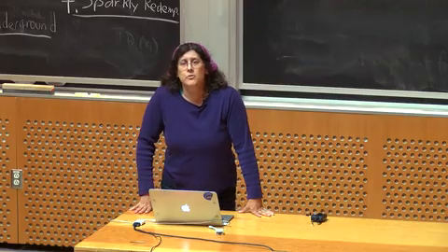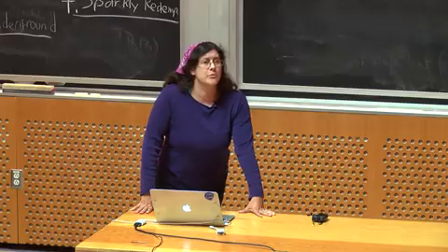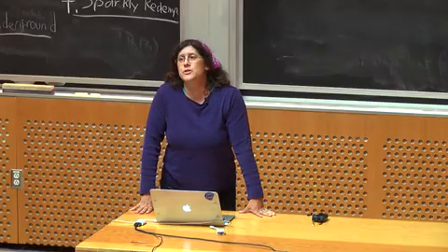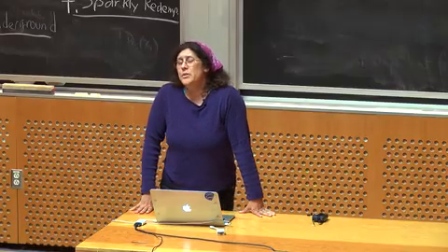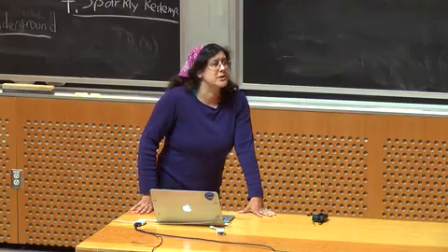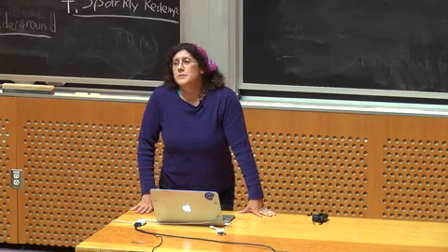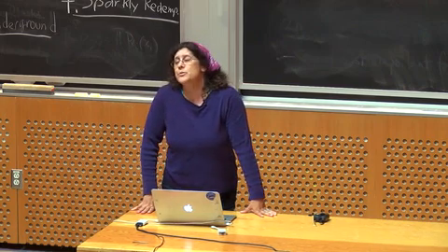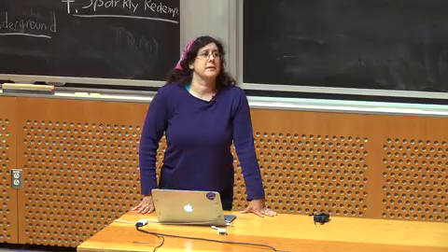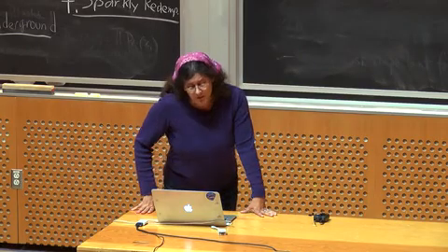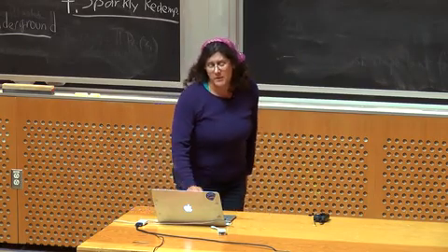It may be that if you talked for another hour, you would find the perfect and ideal solution. But it's also very possible that you're just going to spend another hour talking about it. It may be better, and it usually is better, to go ahead with the best solution you came up with and start implementing that and see how it works. So that's the idea behind time boxing.